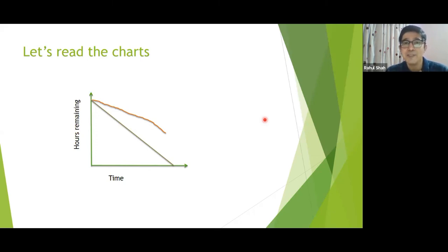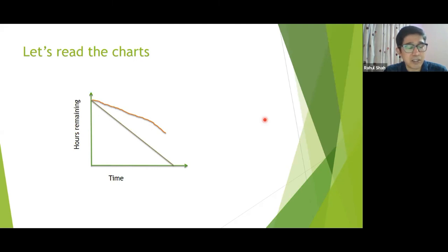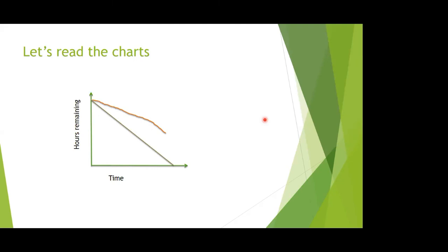What else? The solutioning part might have gone wrong, or overconfidence. Asma, you were saying something? Solutioning can also be not clear. Scope creep also, like some requirements may be added in between the sprints, and that's why the effort is taking more, the team is taking more time to complete the work.